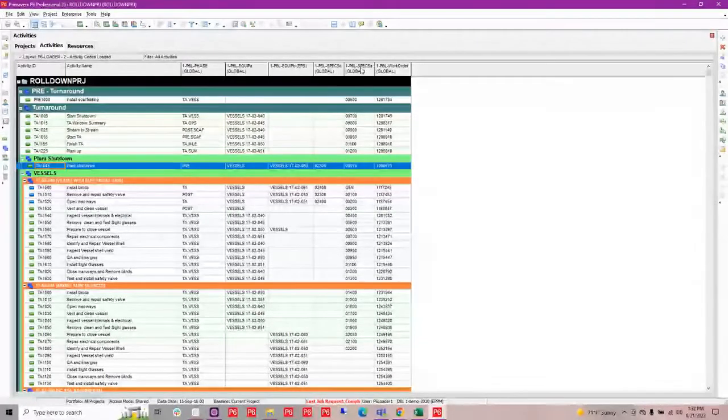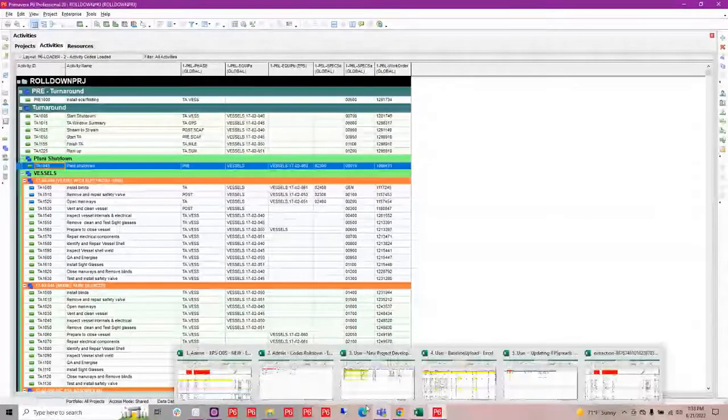For my specs, again, I found two, and they've both been assigned in this project. So I want to combine these, and my specs are only important to my project. So I'm going to push these down to the project level. And the same goes with my work order. My work order is only important to this one project. So I want to push that activity code down to the project level. Now, in P6, they allow us to promote those up the line, but they do not allow us to demote them down. So I'm going to do that with one of our utilities.